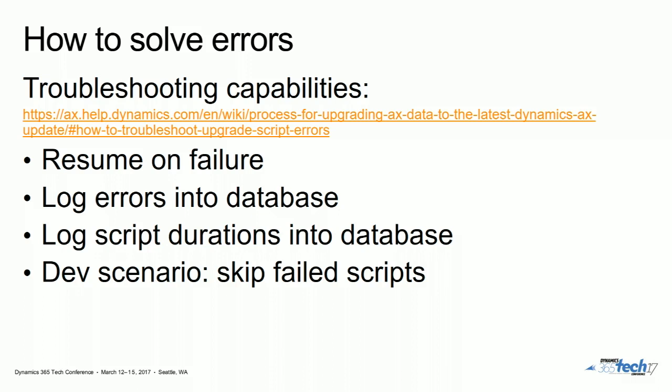What you need is the kind of MS Project type view of them, where you can see ones that are running together and ones that are waiting on other ones, and the duration's laid out like that. Then you know, oh, it's that one that's actually causing my overall time to be longer. So we're working on something like that. For the moment, the durations are there.